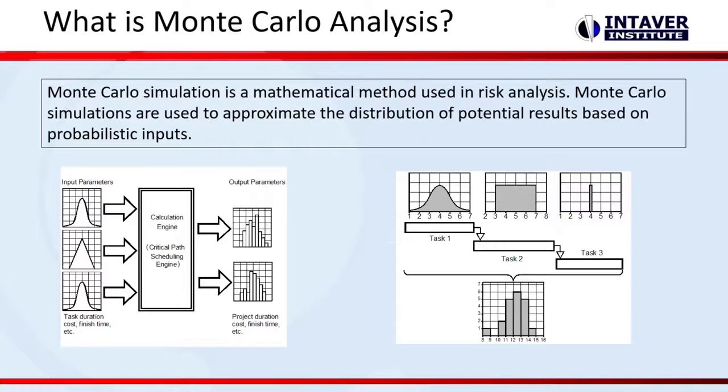During each iteration of a simulation, a calculation engine pulls a random value from each distribution as inputs for the schedule and calculates durations, start times, finish times, variable work, etc. A simulation can include thousands of randomly generated schedules using these random values, and then calculates the risk-adjusted values for the entire project, which are also statistical distributions.